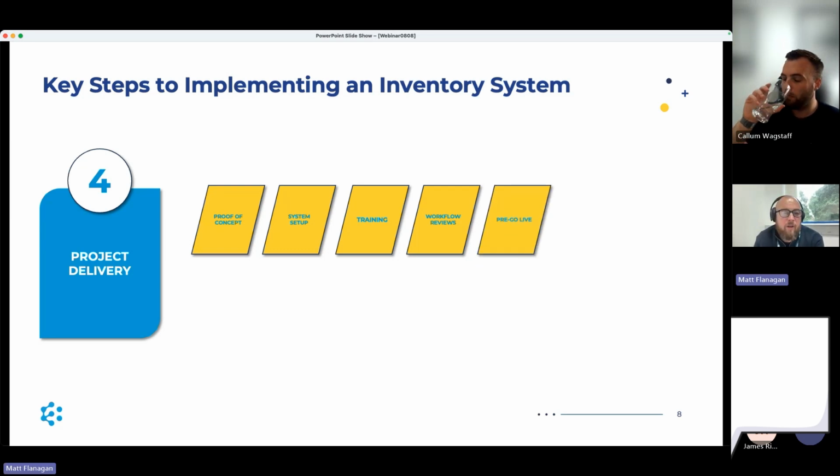You've then got your pre-go live, which is getting your data in place. So it could be stock reviews, stock adjustments all need to be planned in. Also the cutover from the existing system data, whether that be the current sales and purchasing position as well as you go through that. Checking your integrations are working. Then there's a go live period, which is like 1 to 2 days normally of just being there, hand holding, getting the new processes, getting the core processes.